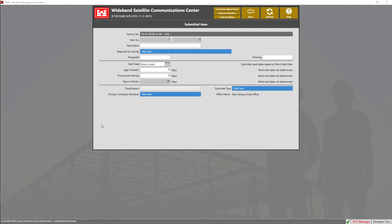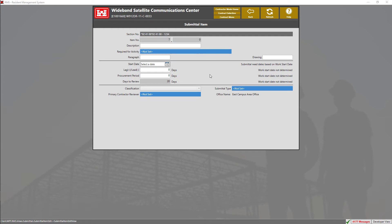Now that we have added our submittal items, you can begin filling out the appropriate information for your submittal. We can set the activity for our submittal by clicking on the blue tile, then selecting the required activity. You can also enter the paragraph and drawing number using the input text boxes. The start date is based upon the required activity that you have chosen for your submittal item. You can also edit and add lag or lead days.